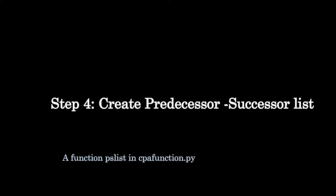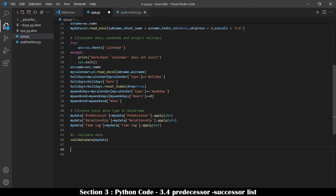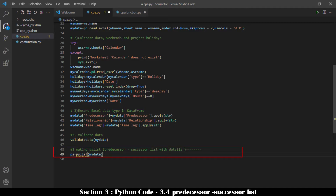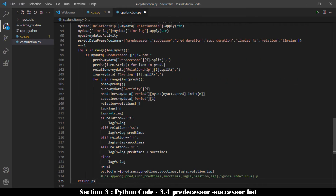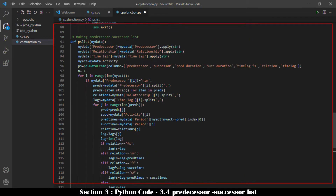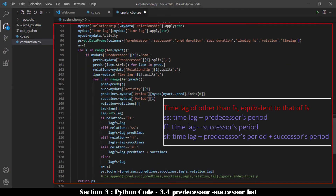A predecessor-to-successor list is created to allow critical path analysis to consider relationships other than FS and time lags other than zero days. The function ps_list is written in cpa_function.py. The list is made by parsing the activity's predecessors to represent one-to-one activity data, and includes: predecessor, each related successor, predecessor period, successor period, and time lag equivalent to finish-to-start relationship for cases involving other relationship types.